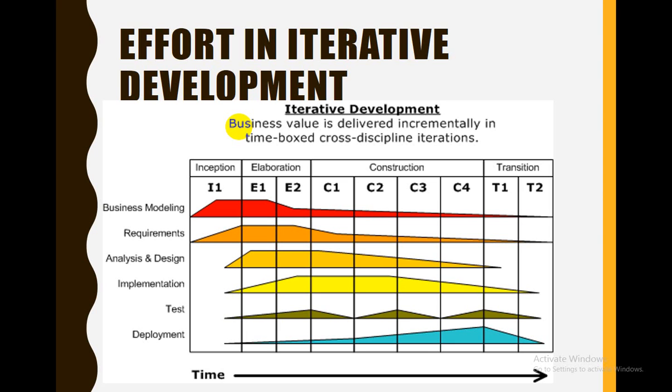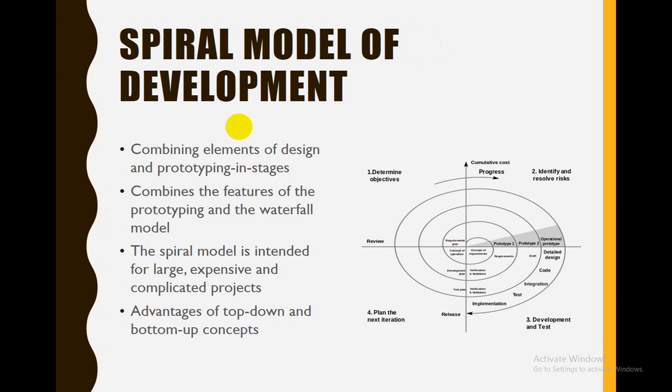If you have multiple offices all across the globe, then instead of planning for all offices, you can start with just one office. If you are a single business owner who has just one office, then instead of going for the entire company, you should start off with one team. Maybe the HR team can start off with Salesforce, or the sales team, and then you spread the product across all teams. Okay.